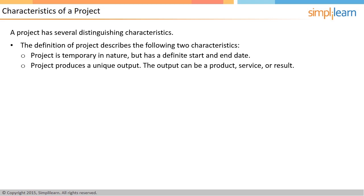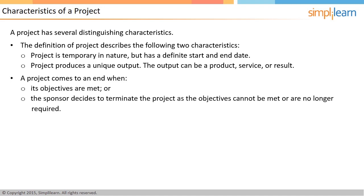Secondly, the project is supposed to produce a unique output. The output could be a product, service, or result. There can be many common activities between two projects, but the outcome of each project should be unique in some way or another. A project ends when either the objectives are met, or the project is terminated because the objectives will not or cannot be met. The other reason to terminate the project can be that the need for the output no longer exists. Usually, the sponsor of the project takes a call about the closure of the project.